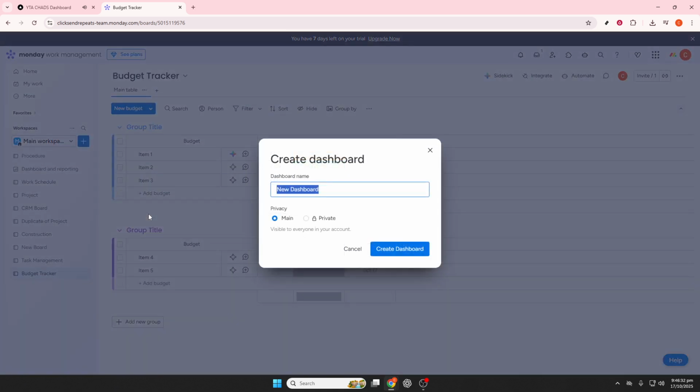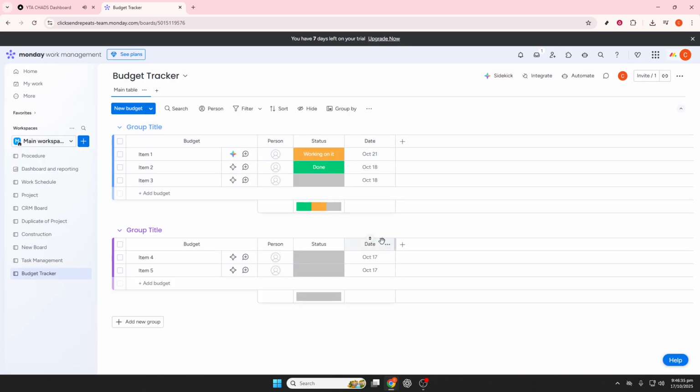To enhance efficiency, automate goal tracking and notifications. Set up automations to save time and ensure accountability. You might set one to notify a manager when a status changes to completed, or remind the goal owner if a due date arrives and the status is still not started. Automations can be customized or chosen from goal tracking templates.